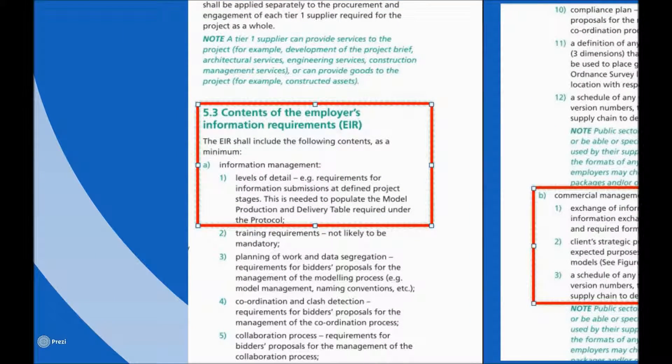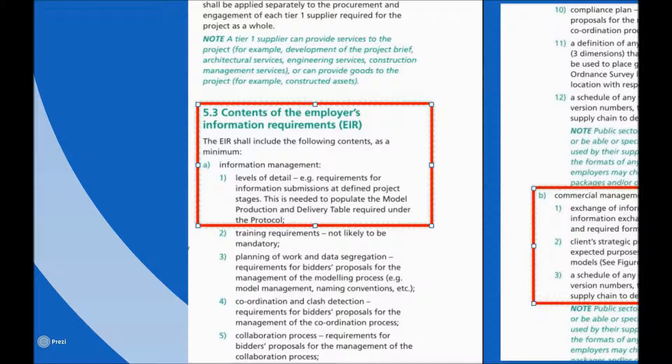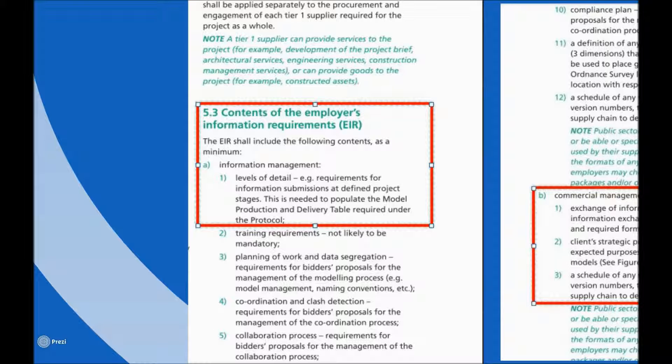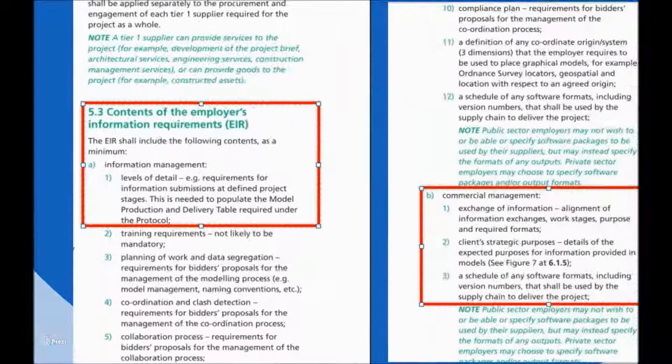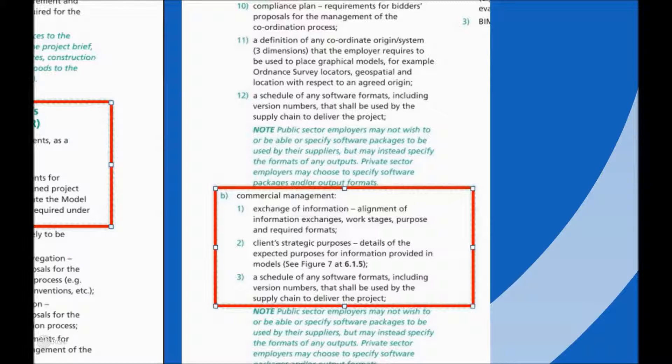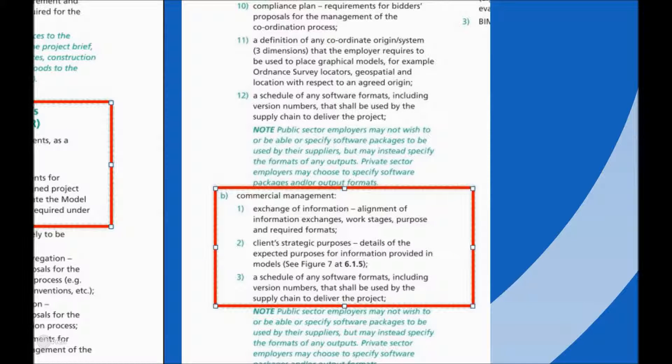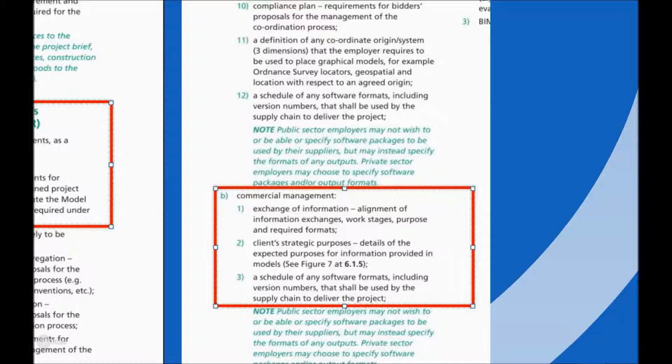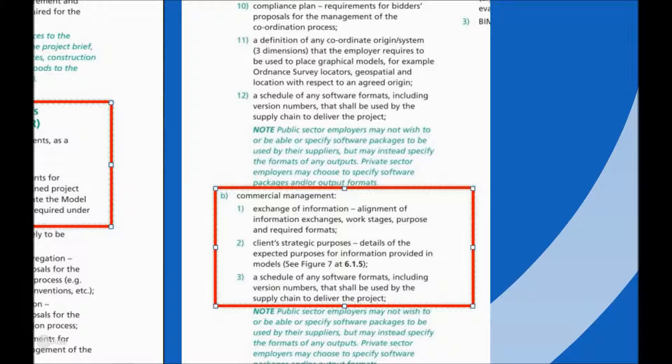This standard requires that a project document known as the Employer's Information Requirements pre-specifies the data expectations for the various project stakeholders at different stages of the project. It goes on to clarify expectations from a commercial management perspective, even requiring software and file formats to be mandated in advance. So how can a QS feed into this document to ensure that sufficient data is supplied at the appropriate cost planning stages?